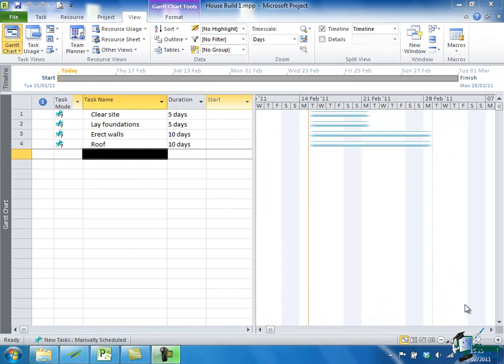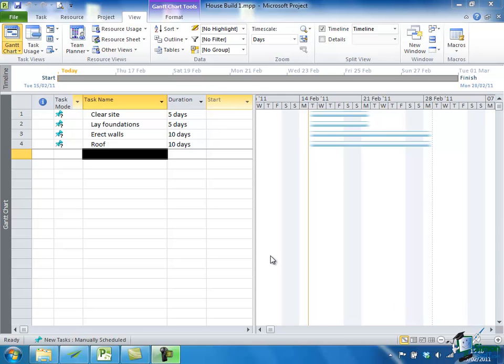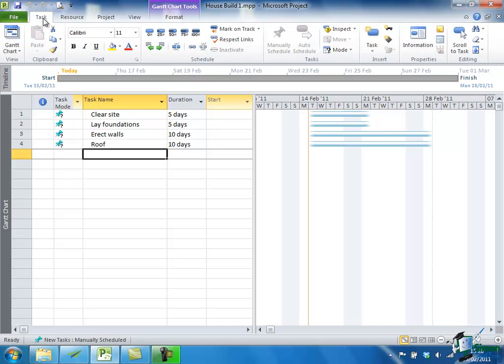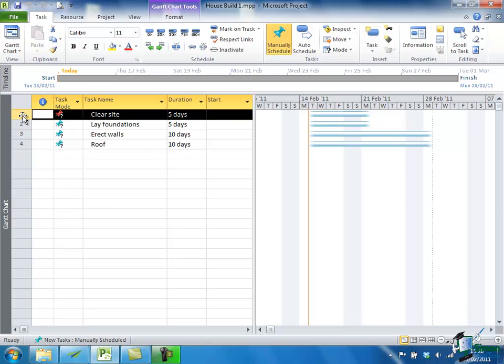Now let's start to do some very straightforward things to improve this schedule. The most obvious thing with it is that the tasks are just not happening in sequence. Now to correct this in a very simple way, if I click on the Task tab on the Ribbon and then select the first task, which is Clear Site. To select a task, just click anywhere in the row of its table entry. So that is now selected and you can see that it's highlighted.